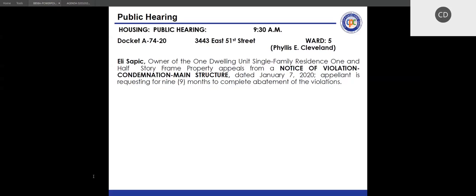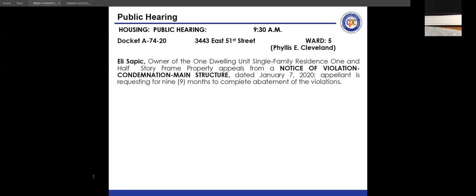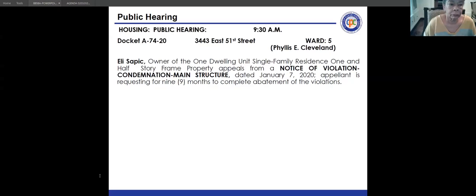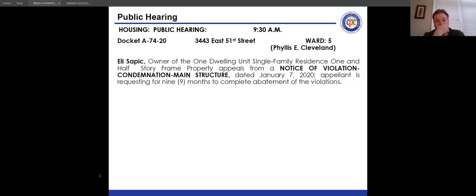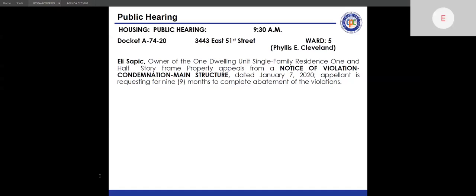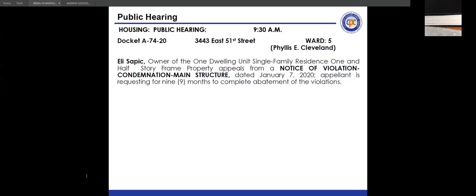Mr. Vanover stated there are no permits currently applied for. The property was condemned early in 2020, pre-pandemic, and has been neglected for some time. It will require full building, electrical, plumbing, and mechanical permits. The wiring and siding have been stripped. Though the city prefers rehabilitation over demolition, he questioned how the property reached this condition and expressed concern about the extent of neglect.